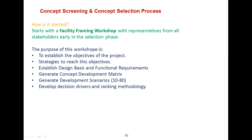How do we start the concept screening and concept selection phase? It usually starts with a facility planning workshop with representatives from all stakeholders early in the selection phase. The purpose of this workshop is first to establish the objective of the project, then strategies to reach this objective, establish a design basis document and functional requirements, generate a concept development matrix based on functional requirements and design basis, and finally generate development scenarios which will be compared and ranked with decision drivers and ranking methodologies.